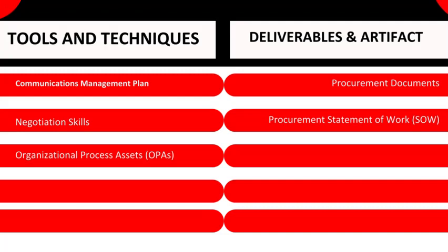The team leader then sends the SOW to potential suppliers and gets quotes. The team leader evaluates the quotes and selects the best supplier. The team leader then negotiates a contract with the selected supplier. The contract includes all of the terms and conditions of the purchase, including the price, delivery date, and warranty. Once the contract is signed, the team leader places the order for the software development tool license.